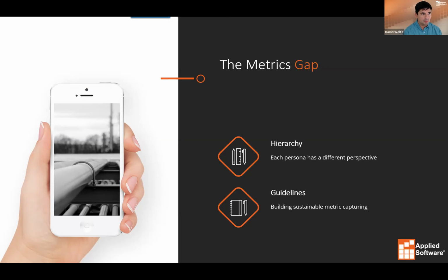And maybe we're going to set a goal of doing a quarterly release or a quarterly review of specs so that they change maybe only 4 times a year. And then the projects aren't dependent on those as much. And so, if you can capture the cost in that effort, then that helps you validate a lot of other things. Also, the metrics is the first argument for automation.